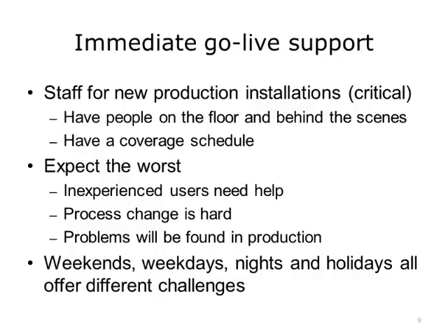Have a coverage schedule, because if serious problems arise, people will need relief. Weekends, weekdays, and nights all offer different challenges. For example, weekends are often quieter, so the data flow is different, and there are different users during those times. In the middle of the night, some systems have background batch processes that could slow down other processes. Some areas might have higher volume, such as the emergency department. Mornings on weekends might have high volume.